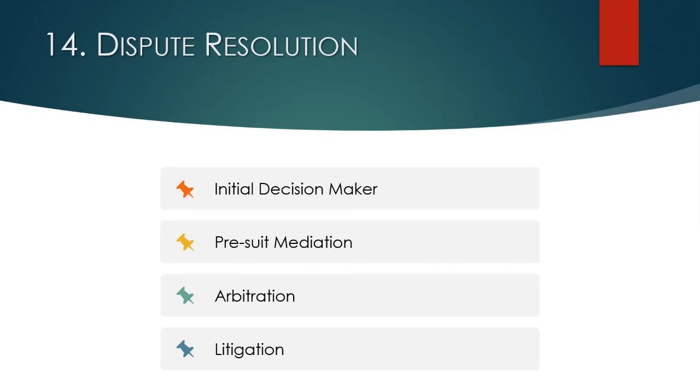Dispute resolution. Any of you that have been involved in litigation on construction projects know that it can be a very painful, very time-consuming, very expensive process. So it's important to make sure that you spell it out in your agreement so you're not litigating that issue. A lot of times people are litigating who gets to decide the case, where it gets decided, what law is going to apply, all of those things that you don't need to be paying your lawyer to argue, and you can cover in your contracts on the front end.